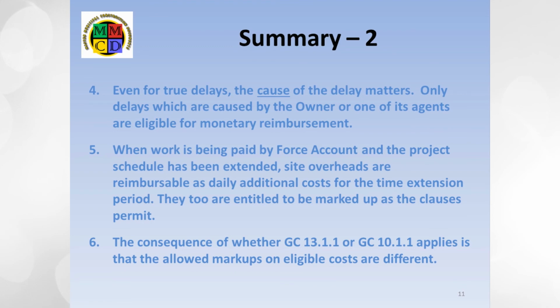5. When work is being paid by force account and the project schedule has been extended, site overheads are reimbursable as additional daily costs for the time extension period. They too are entitled to be marked up as the relevant clauses permit. 6. The consequence of whether GC 13.1 or GC 10.1 applies is that the allowed markups are different.